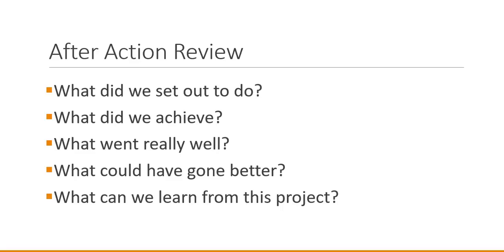4th, what could have gone better? What didn't go as planned? It's important to acknowledge those areas of the project results. And finally, what can we learn from this project? So the idea, again, of lessons learned is what went well, what didn't go well, what the actual outcomes were in relation to the anticipated outcomes at the beginning of the project, all contribute to organizational learning and improve project management in future activities.